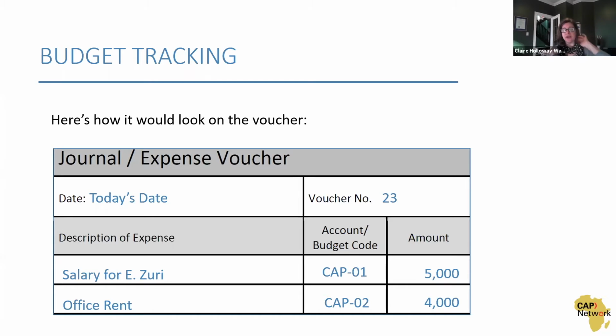If you're only implementing one project essentially, then you don't need two different kinds of codes, just one. Your operating budget and your project budget look relatively similar. It's only if your organization is engaged in multiple projects with different budgets and different funders that you would need to be able to report separately on the funds that funder has donated to a particular project. In that case is when you need to be able to split it out by project. That making sense? Okay.